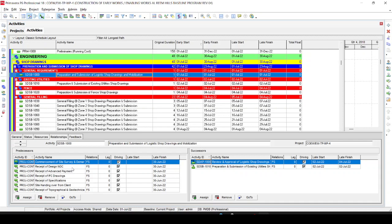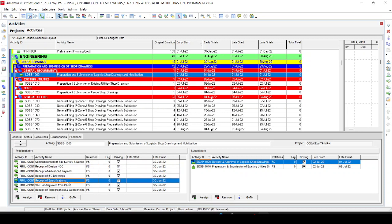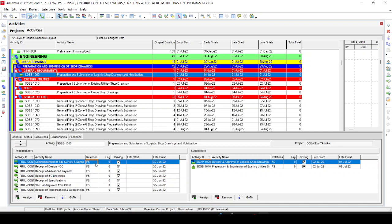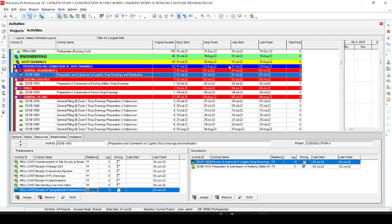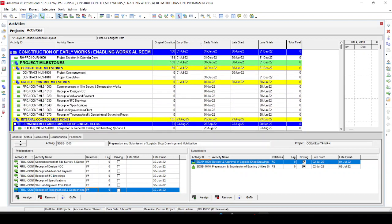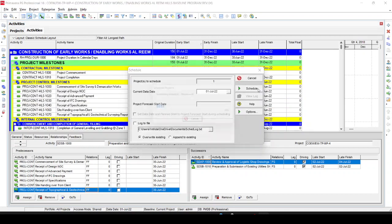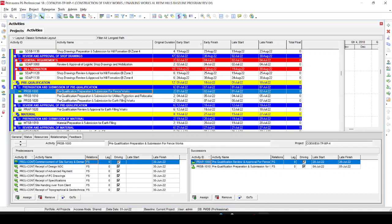You can see all these activities are linked with the milestones using Finish-to-Start. What we should do is change all these links to Finish-to-Finish. I'll change all the relationships now. Let's run the program and see if this resolves the issue. It's still not solved, so there must be more activities to fix. There is one more activity also linked with milestones using Finish-to-Start — we have to change this link to Finish-to-Finish as well. Let's do it one by one.